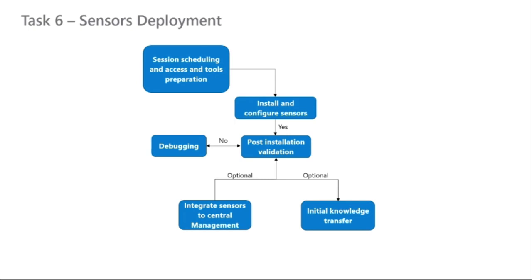Usually at this stage of the deployment, we gather the team that is doing the actual use of the system, and we do a sort of handover to them, demonstrating to them the UI of the sensor and establishing with them the routine of how to work with our solution, as Ariel demonstrated, how to recognize the alerts, how to recognize the events, how to create risk assessment reports, and so on and so forth.